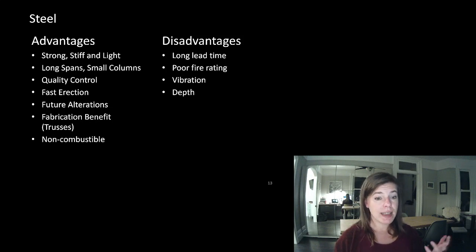Some financing, and this is why it's important to know your client and your owner of the building, because some financing situations will only pay out money to the owner based on visual progress of the project. Which means if everybody's been working their butts off for months and months, but there's not a thing done on the site, there's no money to the owner who's trying to pay everyone to do everything, and we're months into the process and nobody's gotten a check, that can be a problem.